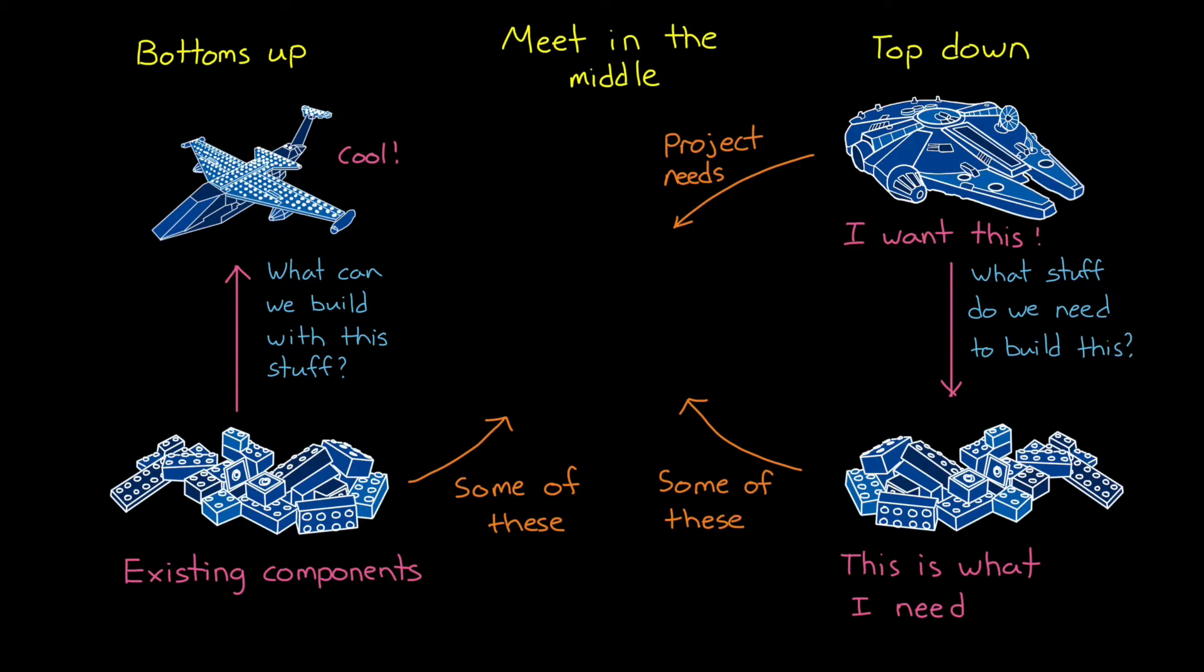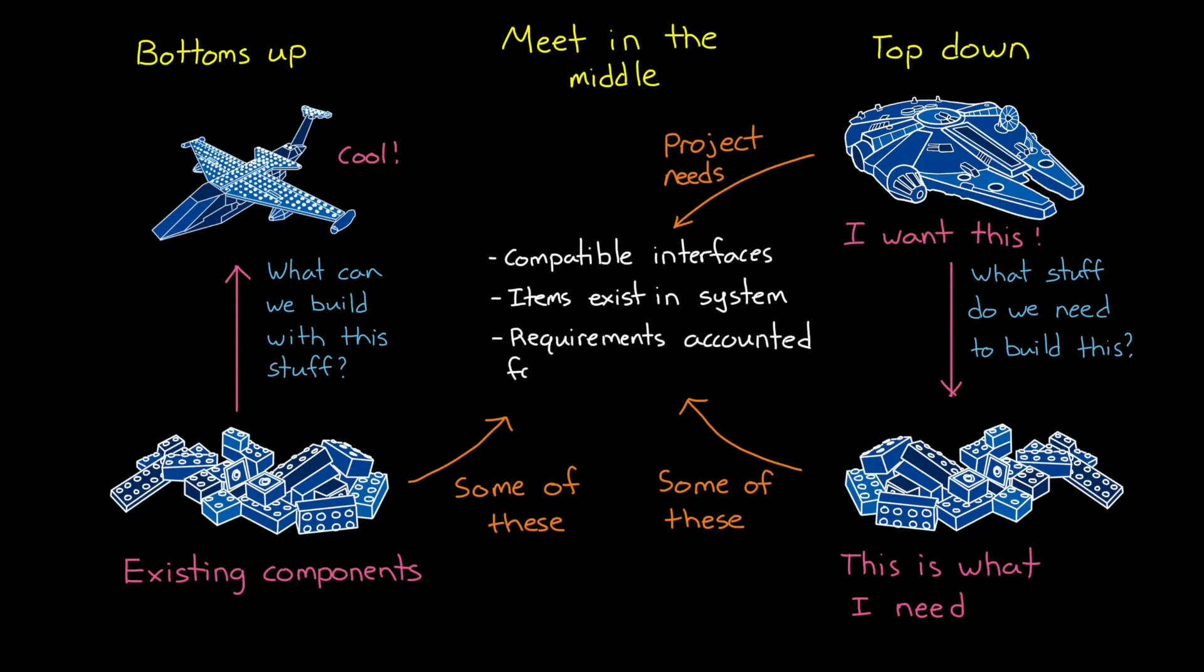And so, in the definition phase, you have to make sure that the design you're coming up with has compatible interfaces with these existing components, and that the items that flow into the component exist in your system, and that the requirements for that component are incorporated into the requirement hierarchy.